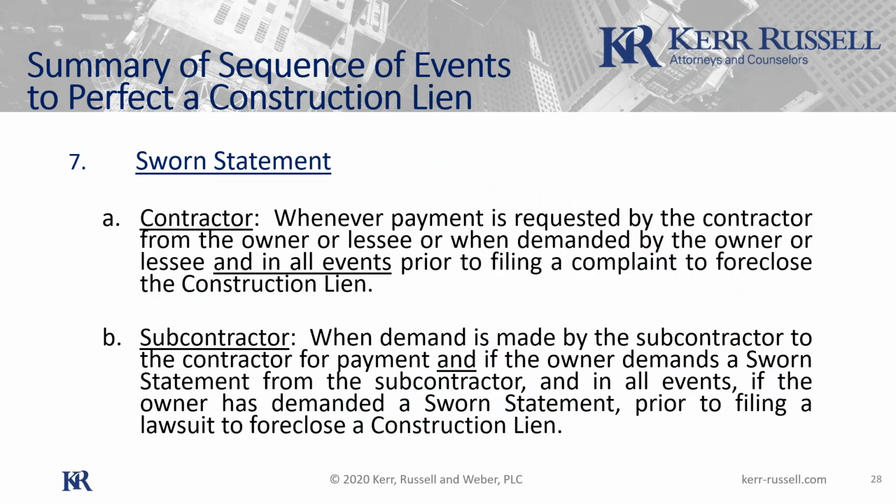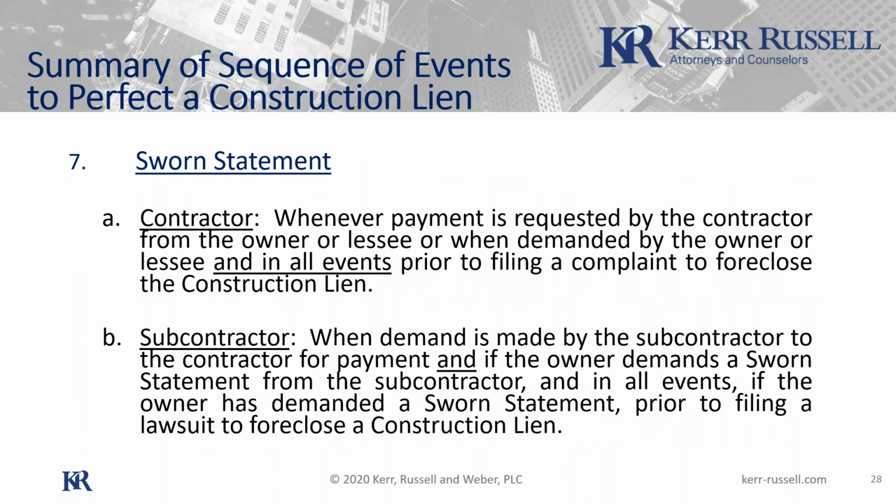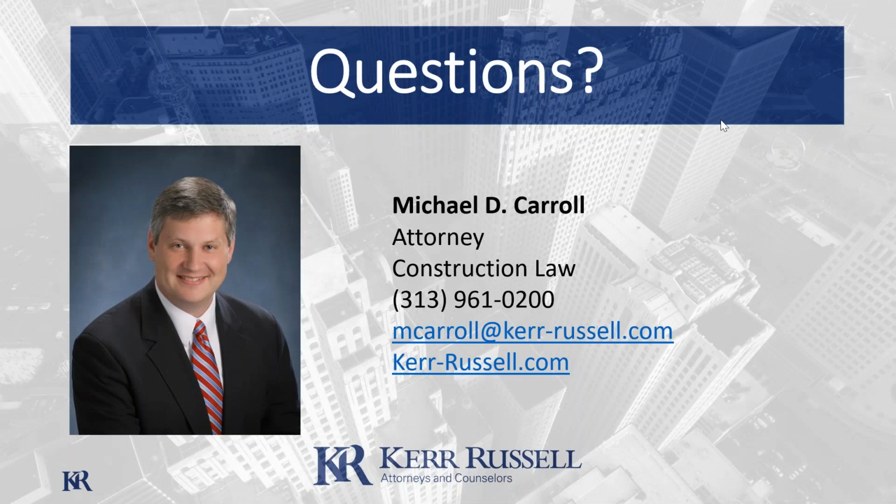Okay, then the next step, number 5, is service of the construction lien. That is by sending it by certified mail, and that has to happen within 15 days after the recordation. And then the 6th thing is to fill out the proof of service and keep in your file that you did send out that lien. Okay, now the next slide, Rebecca. The 7th is a sworn statement that you have to provide before you start suit. Okay, keep going. And then you need to foreclose on a lien within 1 year after it was filed. I don't think there's anything after that, is there, Rebecca? Okay, that brings to a conclusion my speech on the nuts and bolts of filing a lien.